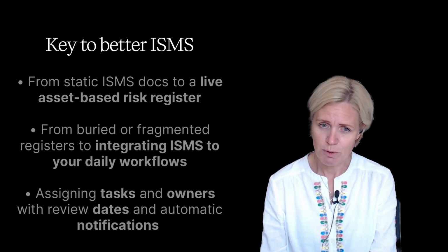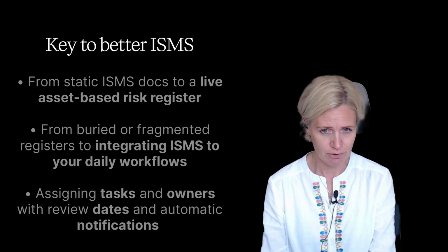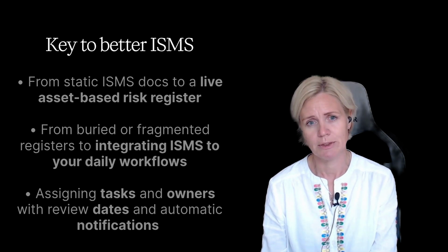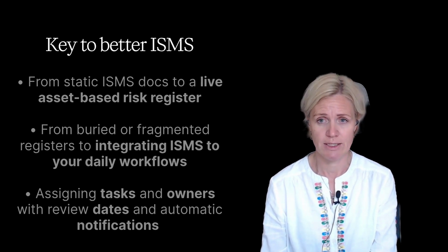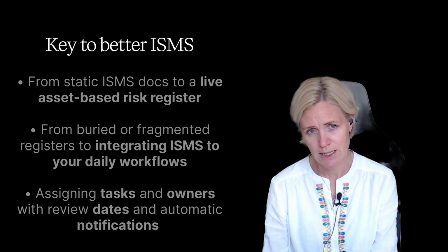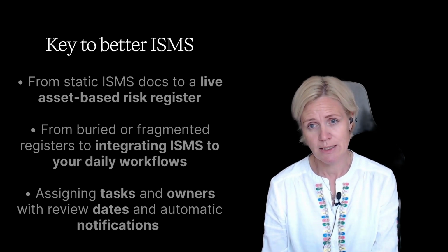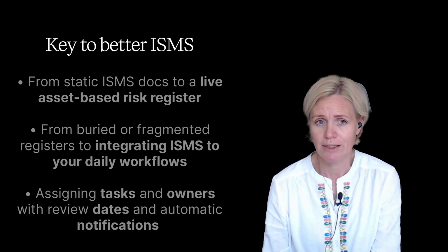This register shouldn't be buried deep in some documents that you cannot find or spread across multiple Excel spreadsheets. Ideally, it should be implemented where your team is working every day, linked to periodic review tasks, and to their owners, who get automatic notifications in case risks rise to critical levels.